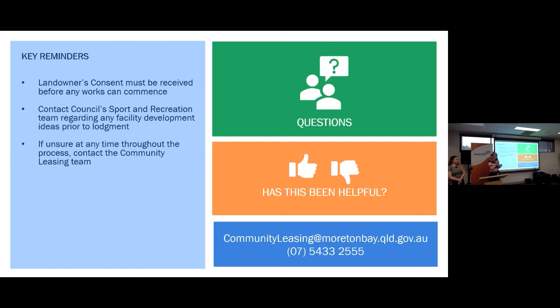For example, if there's any irrigation projects, apologies, it needs to go to our parks team because they need to think about the mowing requirements that may be around it, including fencing, which is a big one with mowing requirements. It needs to go to parks. Signage, it needs to go to public health to make sure that it's meeting all the requirements. So that's why the process can take a while.